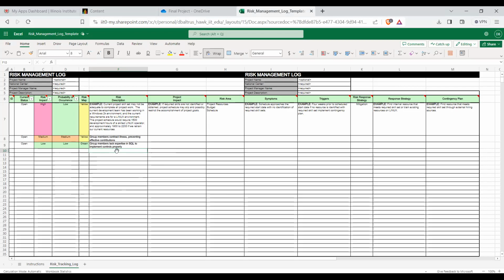Missing the due date seems too simple, but maybe plan properly so we don't miss the due date. Yeah, so it's tight. This is going to be a lot of stuff. It's going to have a tight schedule. So you'll put possible tight schedule, and later you have to talk about your response. Basically you'll have to overlap tasks. In project management, you can say, I'm going to do tasks A, B, and C in parallel, and you'll have to do that in order to make this work.